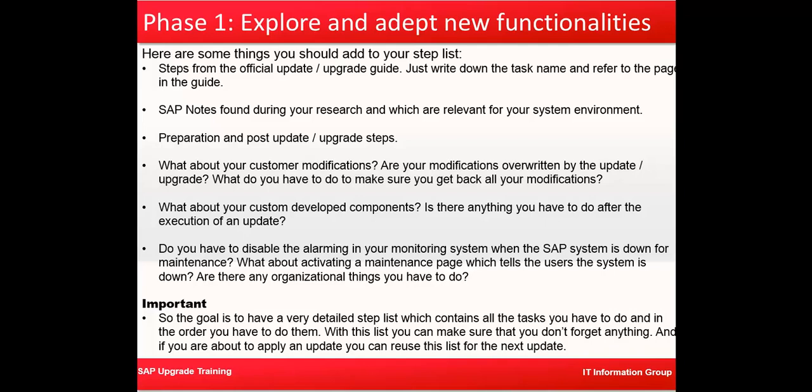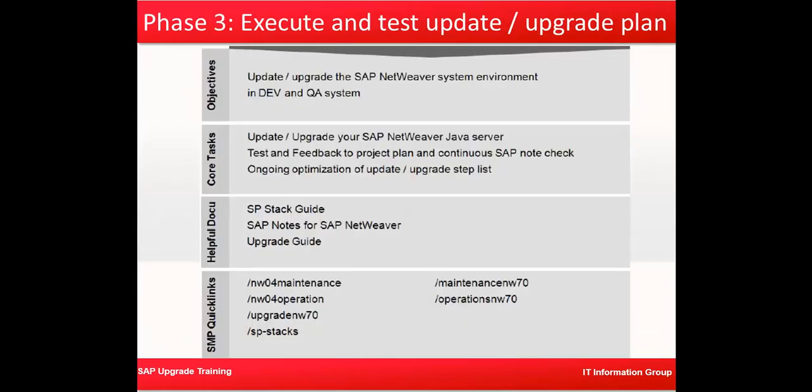So the goal here is that you upgrade your sandbox system first. You prepare this using your preliminary or first cut list. After your initial upgrade, you apply whatever learnings you had in your first system into your development system. You apply your learnings again into your QA systems, and after that you are ready, and you have already completed 3 cycles of upgrade before you upgrade your production system. So that is an iterative process you need to perform before you can upgrade your production systems.